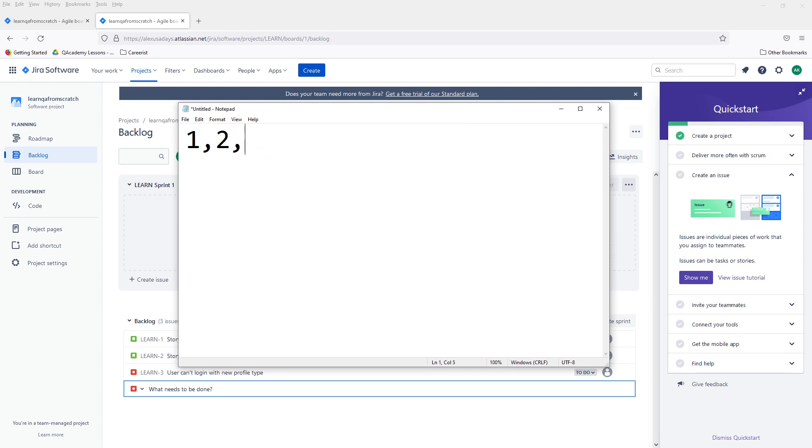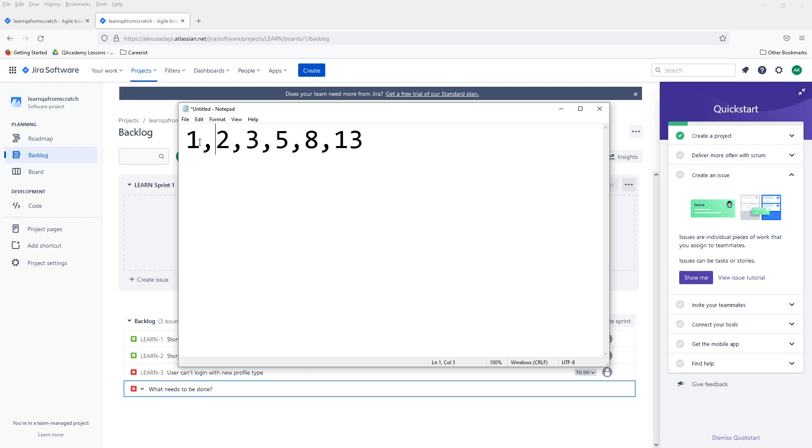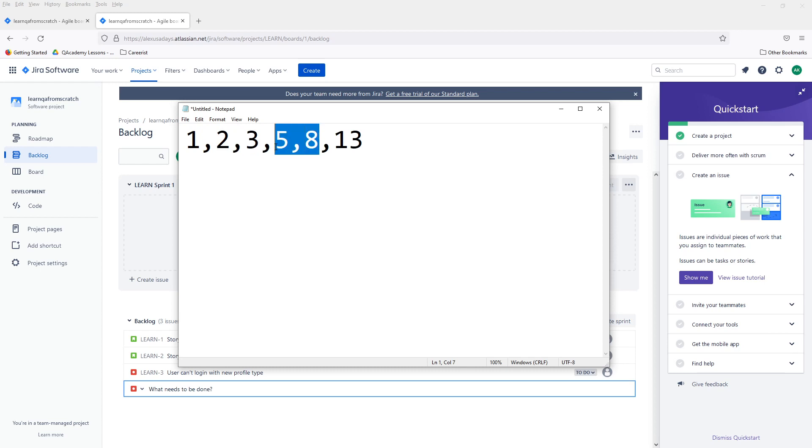So let's say they talked and then they have to give it some points. Normally, complexity is measured in Fibonacci sequence. So one, two, three, five, eight, and 13 is the max. So each number is a sum of the previous two. So one plus one is two, then two plus one is three, three plus two is five, five plus three is eight, eight plus five is thirteen.